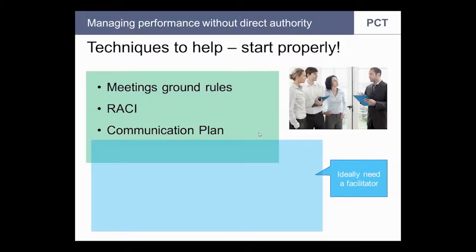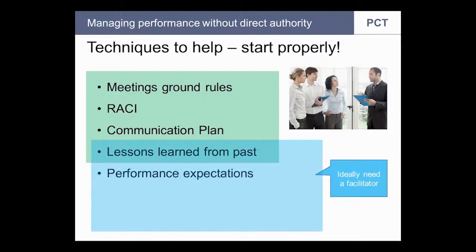Looking at what went well and what were problems in previous projects helps to focus the team on planning for forthcoming work. This technique and some others in this light blue box are a little bit more challenging to use and benefit from the assistance of an expert facilitator. Agreeing the expectations of performance from team members around quality, timely deliverables, and so on can be very powerful.